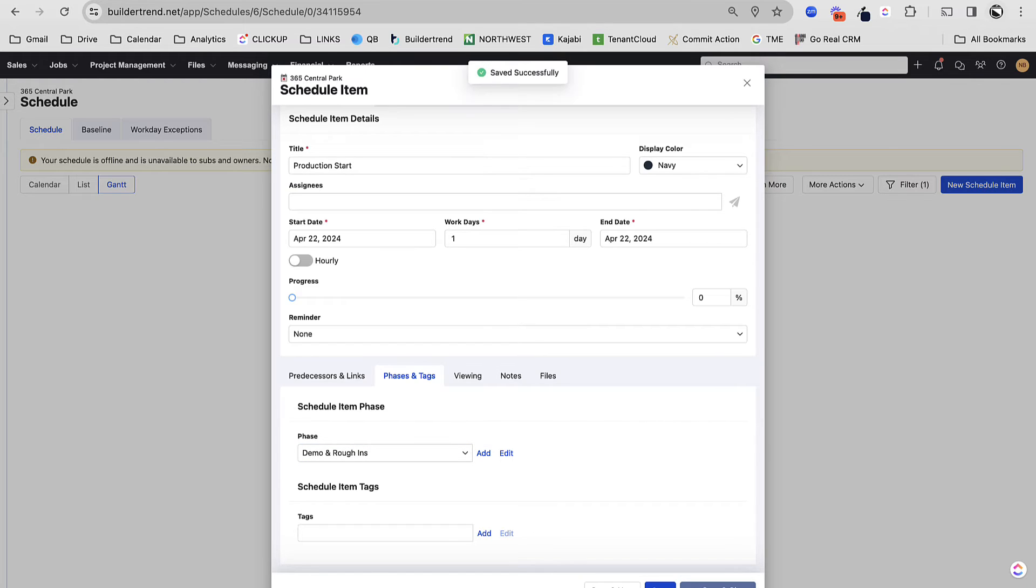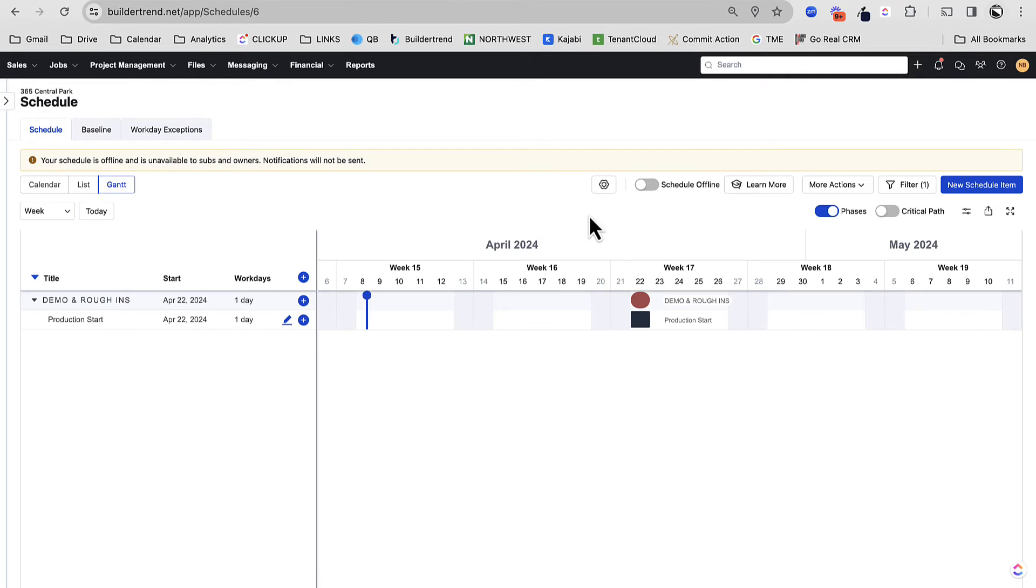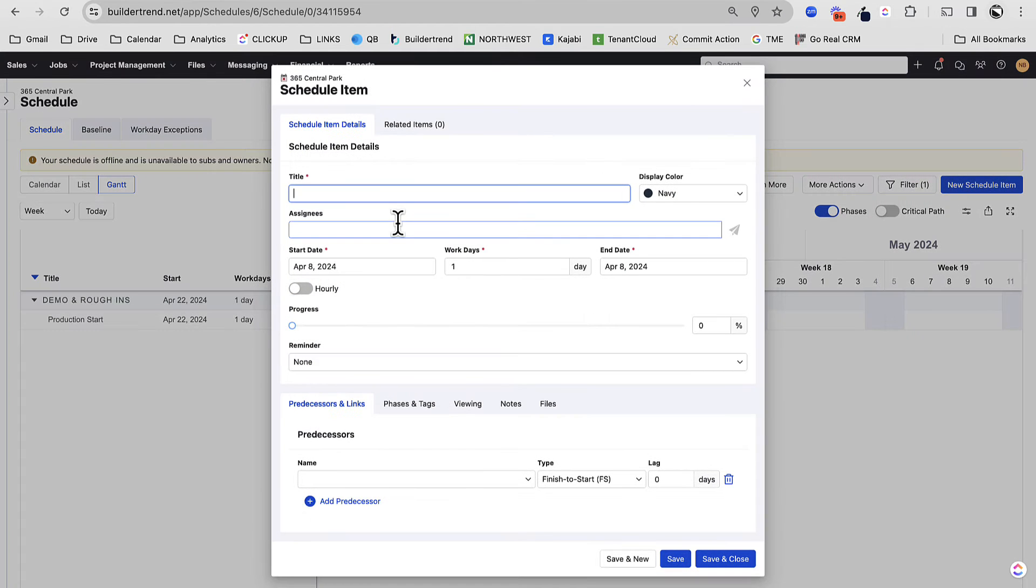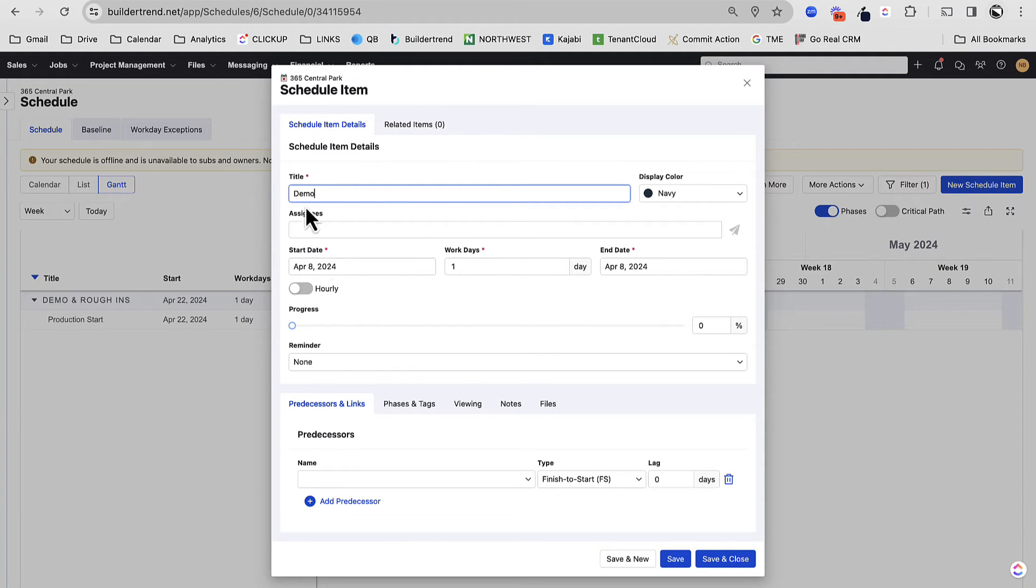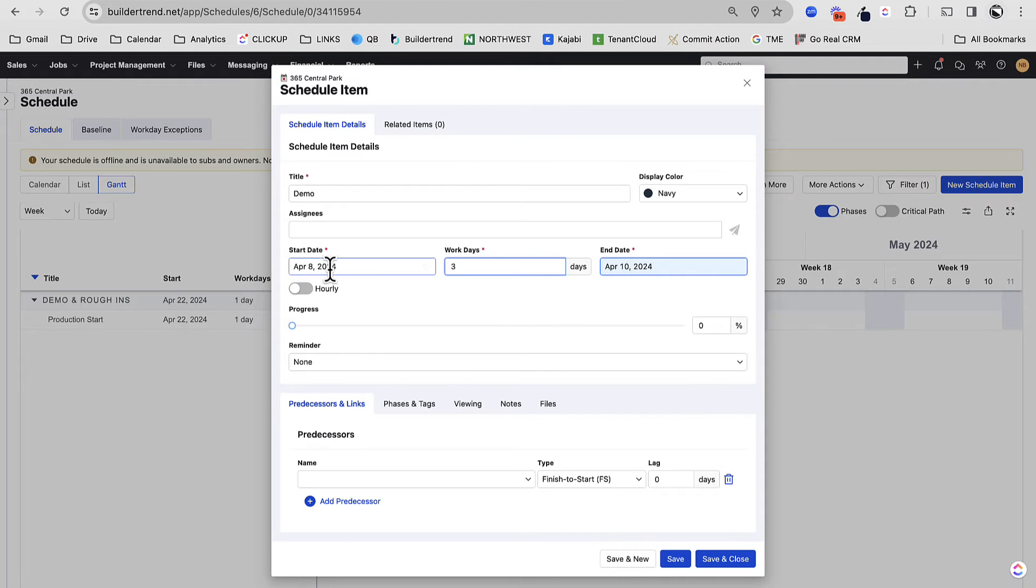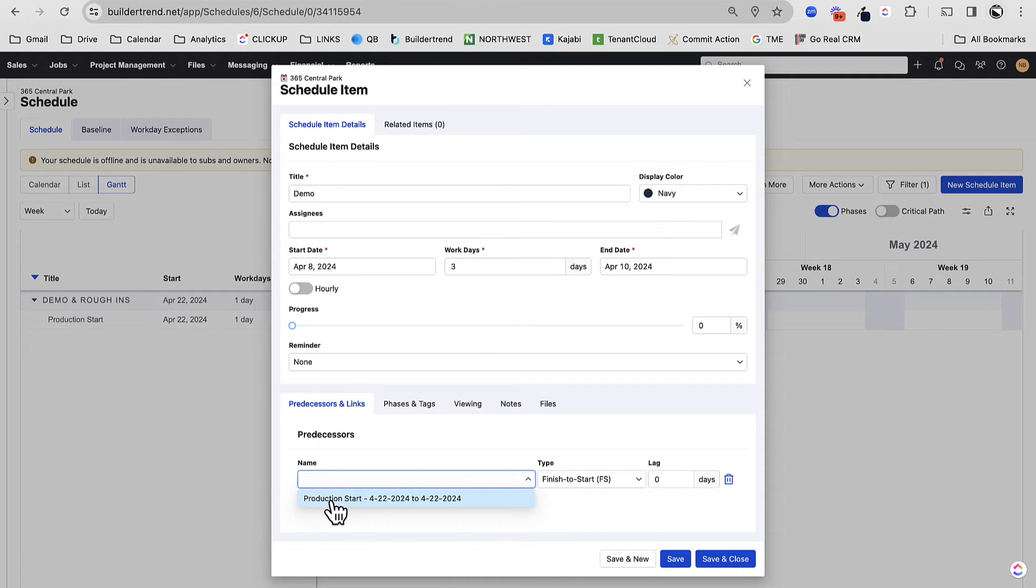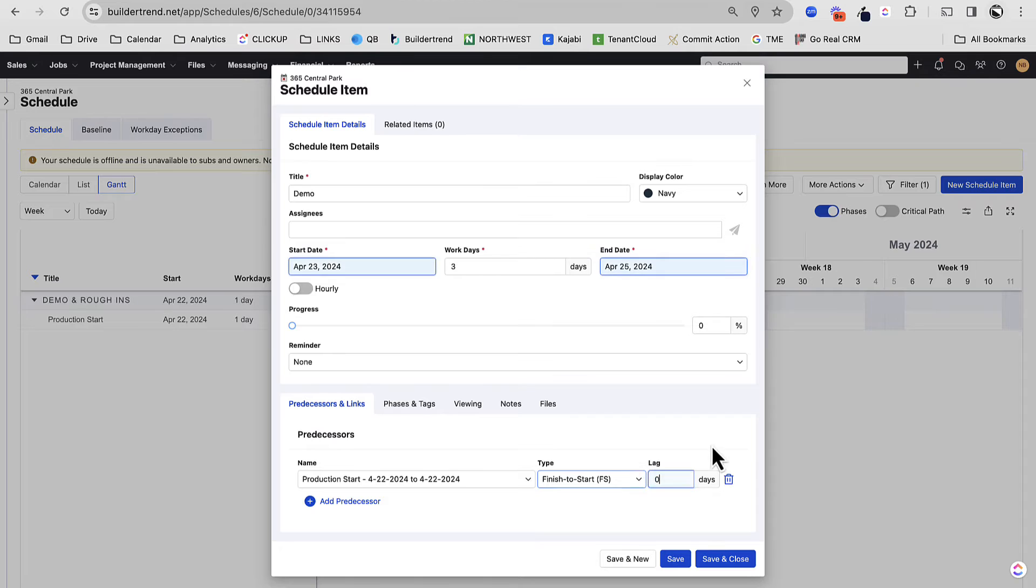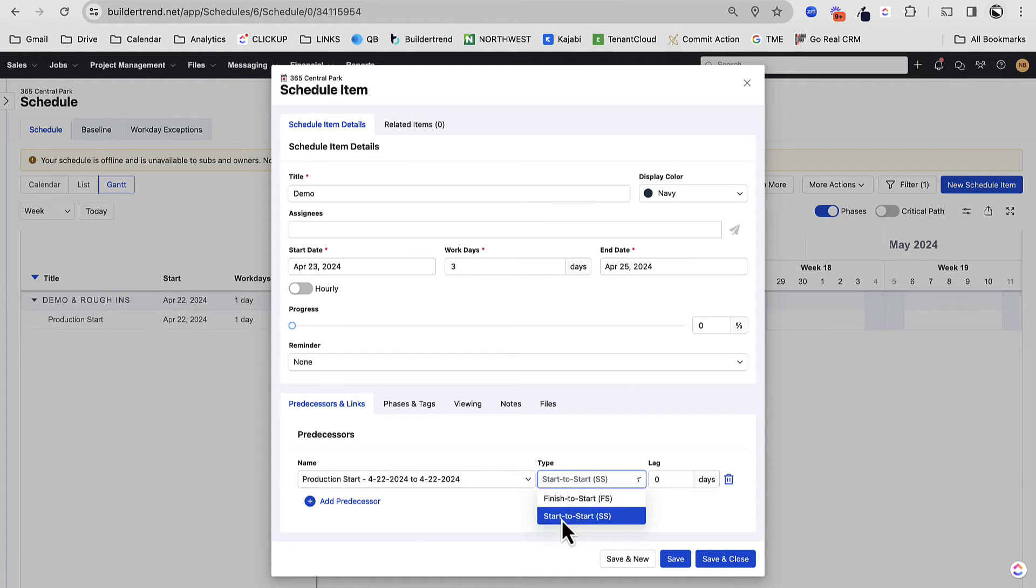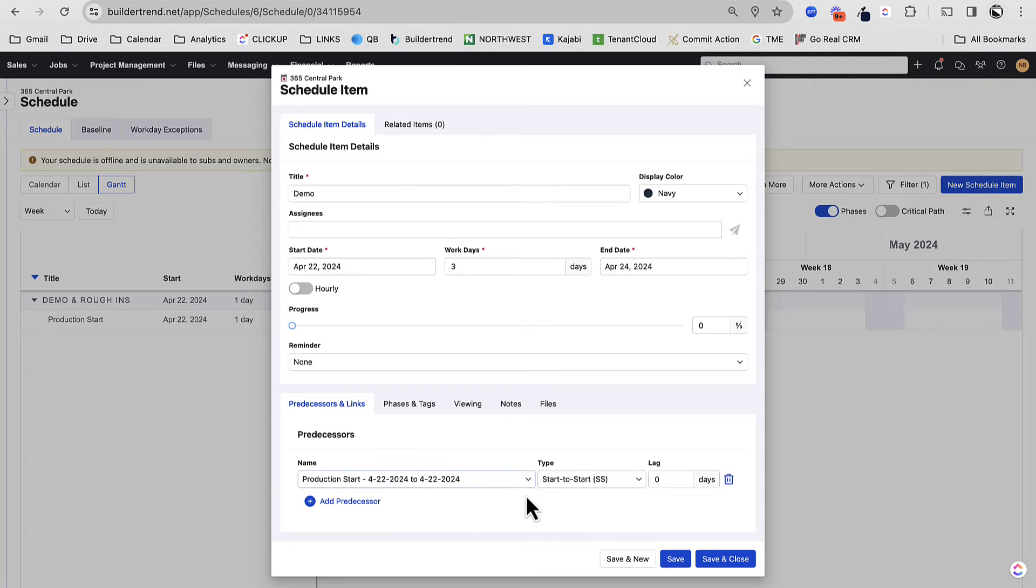There you see one single line. Now the reason I like to have a production start is for this exact reason. The first thing that we usually do on a project is we do demo. So that should be some kind of task. Now demo might take three days or so. I don't really know when I'm going to start it, but here's what we can do. And we're going to start to build in predecessors and dependencies. I'm going to say that demo is dependent on my production start with a lag of zero days, meaning the day that my production start happens, I'm going to start my demo.